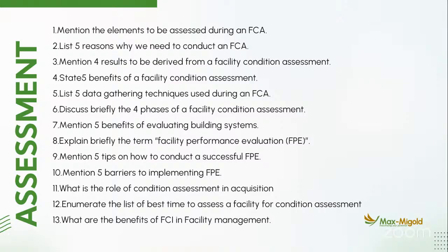Now, I told us that facility condition assessment is a multidisciplinary kind of assessment. It's not something only you carry out. If you are to do that kind of assessment, you need yourself, your architect, your QS, and your MEP engineers, and these are the people that will do a thorough assessment for you.